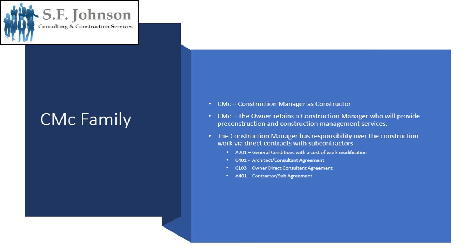The next set is CMC, where the construction manager is also the constructor, or the contractor. In the CMC delivery method, the owner retains the construction manager who provides pre-construction and construction management services. The construction manager has responsibility over the construction work via direct contracts with subcontractors. The forms within this family include: A201, general conditions with cost of work modification; C401, architect-consultant agreement; C103, owner direct consultant agreement; and A401, contractor-subcontractor agreement.